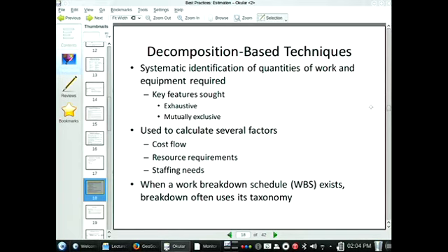The key approach that I recommend, and that you'll see applied widely within the software industry, is a technique known as decomposition. So here you take a planned deliverable, a planned task, apart into pieces, and you estimate those pieces. Why would you do that? Because, amongst other things, the estimates for those pieces may be off on one side or the other, but often those errors cancel when you add them together. Connor mentioned this notion earlier. You group things. Sometimes there's errors in the positive direction, sometimes in the negative. Often those errors are smaller when you think about concrete things, but they often will cancel out when you add them together. So that's one reason.